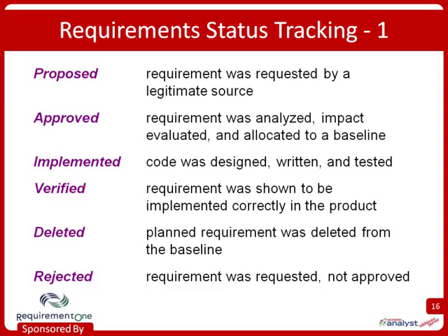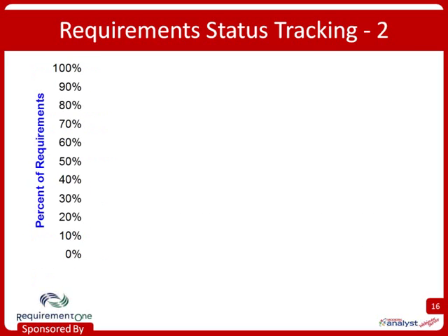That does happen. So once you've collected information about the baseline set of requirements that was allocated to a particular project or release or iteration in this way, I think you can get some real insight into how you're coming along towards completion. So if my manager comes and says, hey, Carl, how are you coming on that subsystem? Instead of saying 90% done, I could say, well, 60% of the requirements are implemented and verified, 15% are implemented but not verified, and the rest are not yet implemented. I think we've got a pretty good understanding of where we're really coming along on that project.